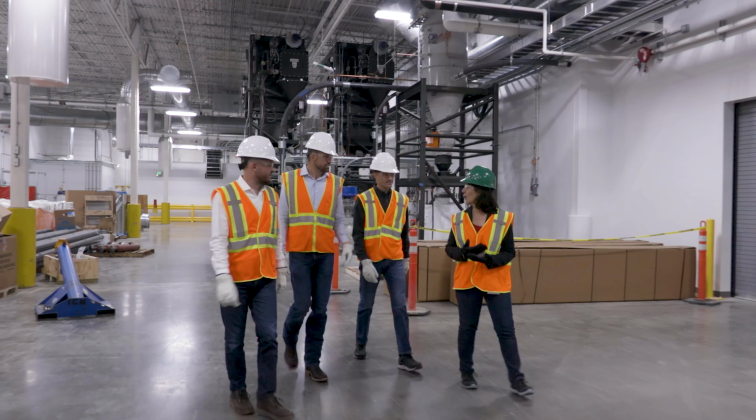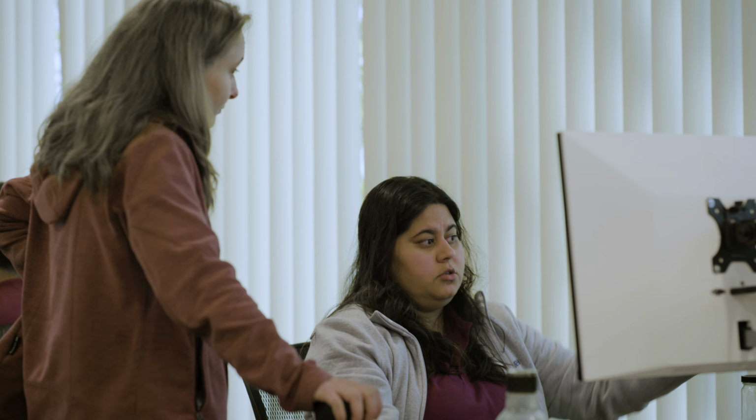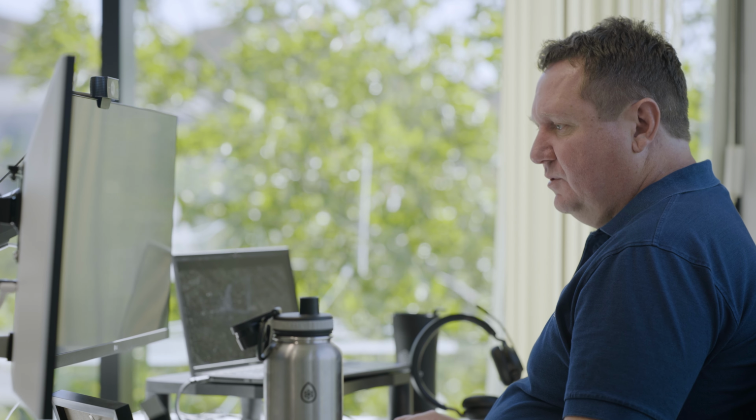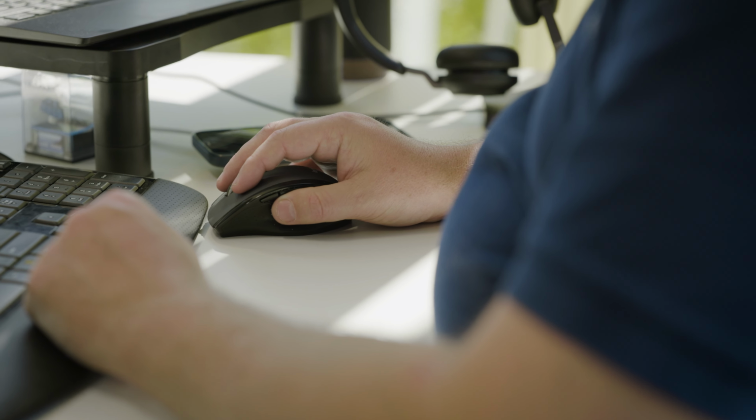We decided early on to utilize the CoorsTek development portal to help us track requirements, test cases, and the development effort on the Andea side. In the end, we were able to quickly see the KPIs and the progress of the development effort. We invested heavily in making sure that all new development requests went through Brian, no matter how small. This had 3 major benefits from what we could see.